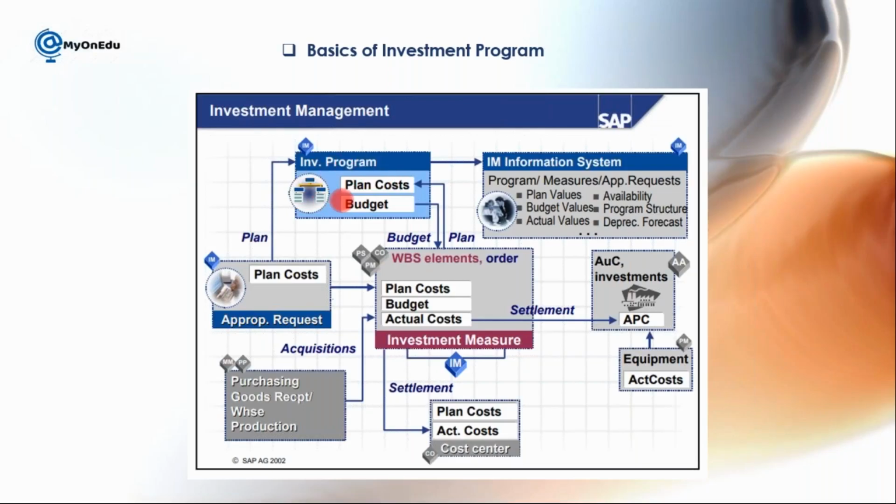From the investment program itself, you can transfer the budget to the PS project. This is a little complicated, but it's very practical. It happens only in the big organizations, right? Yeah. So you are saying the approval as well as this automation are two advantages compared